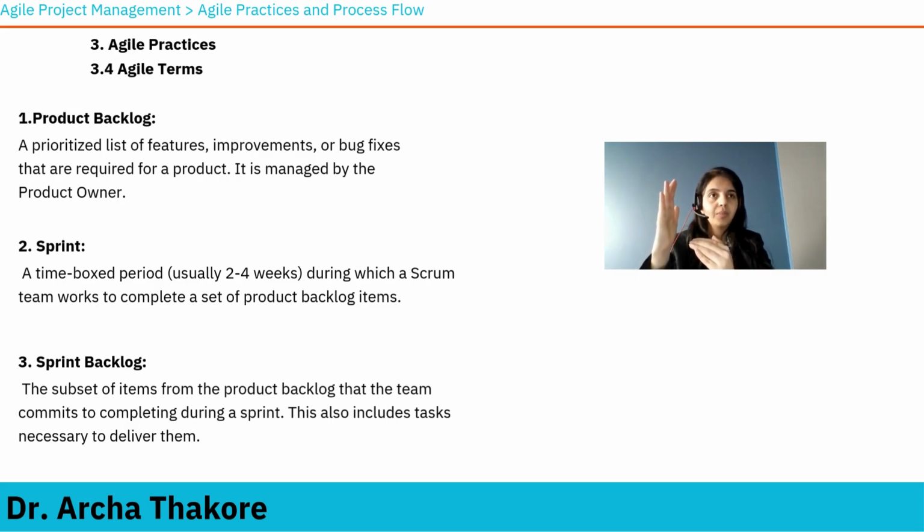And we need to remember that agile teams tend to be empowered. So, the product backlog is created by the product owner, and then from that, the team uses a pull mechanism, not assigning work, but taking on work. They pull, okay, these are the three items that we want to work on in this sprint. How that planning is done, there are techniques, we will talk about epics and stories and everything when we talk about agile planning, so hang on.